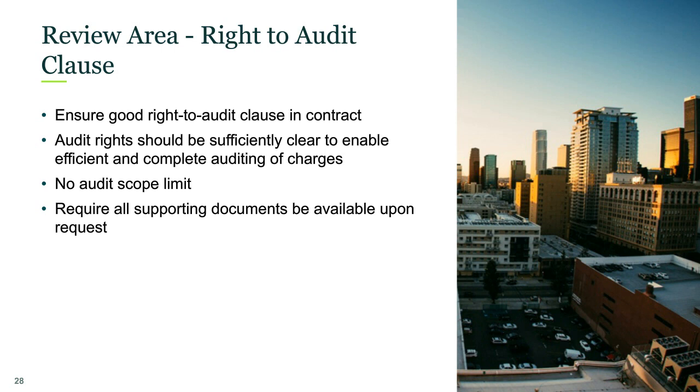And then just a final note here is, if you have the right to audit clause, exercising your right before retention is paid is a great practice. Once you've paid the contractor, and let's say you do the right to audit clause, you may not be able to get all the information that you want. There's less incentive.